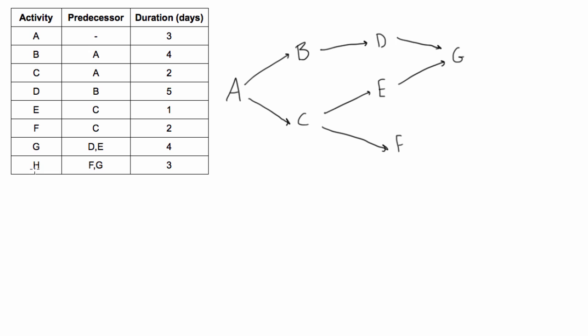And then activity H, which is apparently the last activity in our project, can start once F and G are both done. So F and G, and we'll go like that, and we'll have activity H.